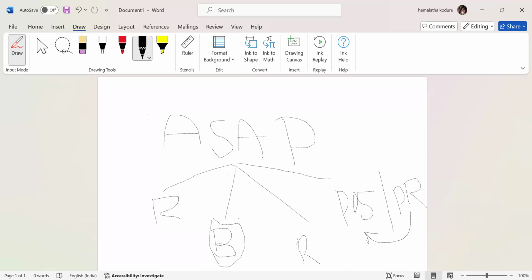Either we call it a blueprint document, or some companies call it a high level design document, HLD. So now the requirement gathering phase is completed and the blueprint is completed. You have plenty of data and your design is also ready. What has to be done in the GL accounts, in accounts payable, in accounts receivable, what banks should be created in banking, all this information you update in this document and send to your client. The client will then give the approval.